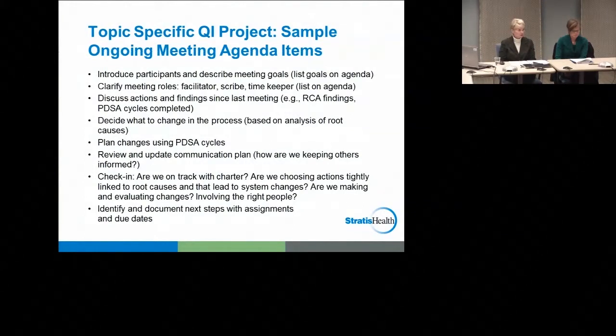You want to make your plans clear as you implement your changes. Then as you test these changes, you want to study the results. How did it work? What things were good? What things would we change? So basically, you make one of three decisions. You either adopt the change because it works so well, or you adapt it. That's what you do most, where you change it a little bit, tweak it, or if it totally flops, you just abandon it. So the group will make that decision.